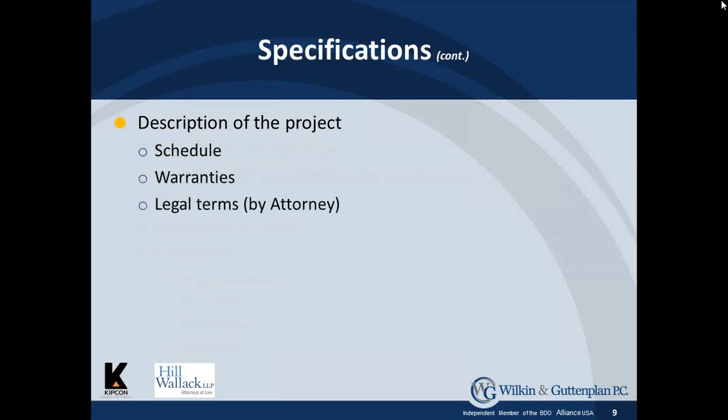The specifications also include the schedule for the project, and generally what we'll do is ask the contractor to provide us what their schedule is, so that we're going by what they feel the job can be done in, and we can hold them to a schedule because they're giving us the schedule. And in some cases, there may be damages associated with that schedule, where if the contractor takes longer than the schedule they give you, they may be responsible for paying the cost of any oversight of that project. But a schedule is very important.